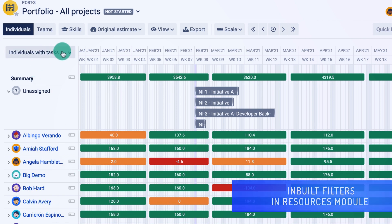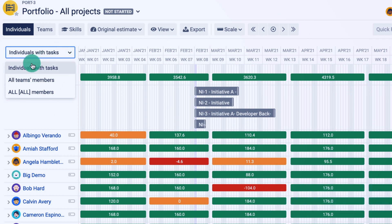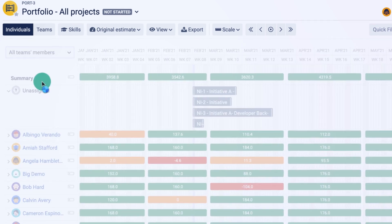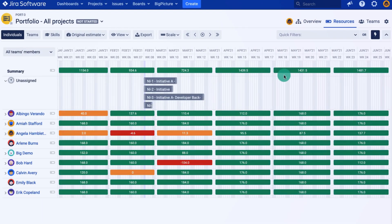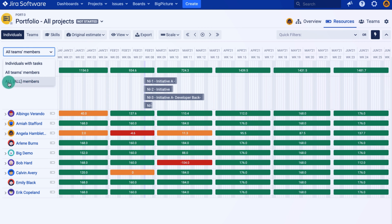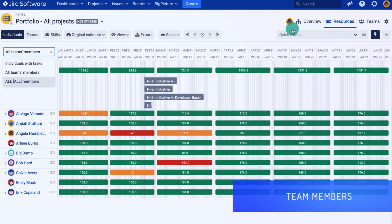Now there are a couple of filters here, and these are quite important. As you can see, I can either show individuals with tasks, which will capture all the tasks and adjust the list of resources. I can display all team members, which will show me the resources only from the teams that I've predefined, or I can actually use all team members. Now, you might not necessarily see all the resources unless you create a team with all your resources as team members. So this is quite important, please keep that in mind.